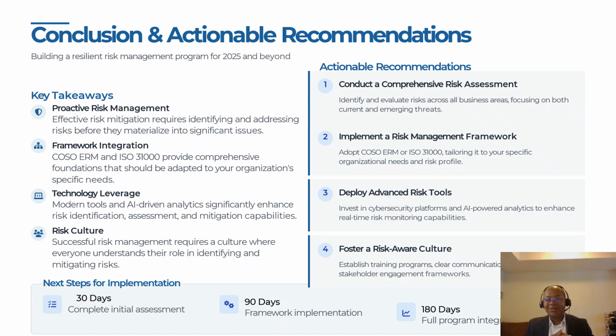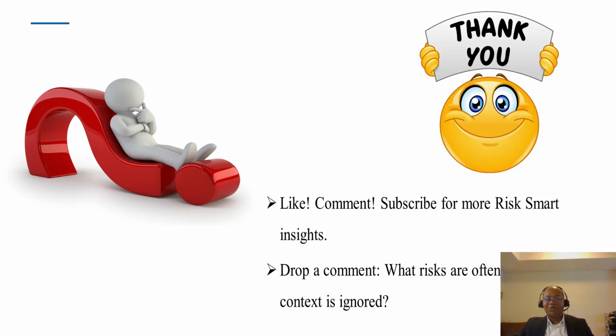Here, I propose some next steps for implementation. Within the next 30 days, complete your initial risk assessment. Make it as robust and as detailed as possible. Within the next 90 days, implement a framework, either the ISO framework or the COSO ERM framework. Within the next 180 days, ensure you have a full program integration for your organization. This will be so helpful, and you will be happy you took this initiative.